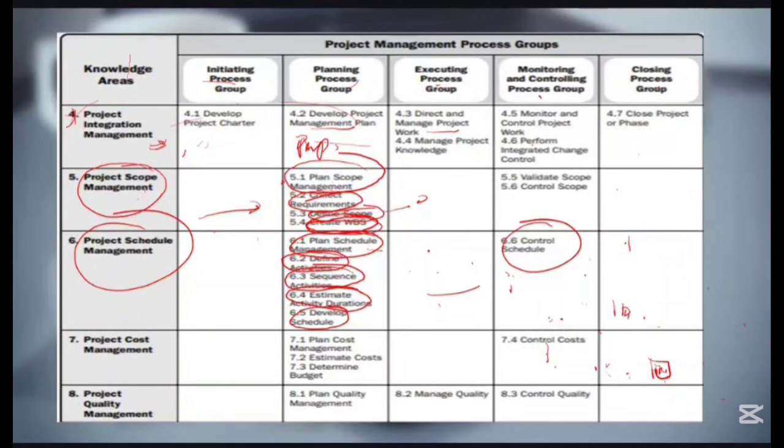So we use other techniques. We'll talk about it. Sometimes you might be running late, and if you don't take action, the project will be dragged out. You delay the project. So what do you do? You may have to run some of the activities at the same time. Initially I wanted to place the cake before bringing in the canopy guys. Now we don't have much time. We are running late, so the two could go together. We check: is it possible the two go together? CCB says yes, it's possible. It won't have any risk, any repercussion. So just place the order for both. The money will be available. So just do that to save more time.